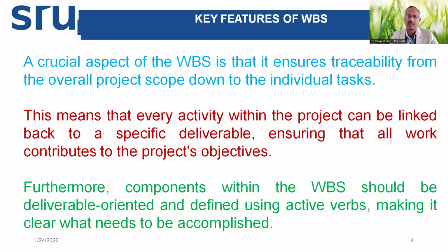Now, the subcomponents at the bottom of the WBS, each one is connected to their respective deliverable. So this ensures that all work contributes to the project's objectives. Means clearly defined, all are connected. We make sure that nothing is missing. Then each one is monitored without any missing element or task. There's no surprise in the end that something we forgot.